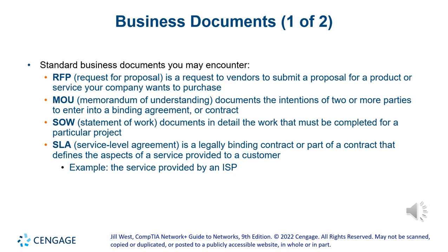Because, I don't know, a company might say on the RFP, I can provide you with the wireless, but I'm not a cable company. So you provide the cable. So you create a memorandum of understanding of what part I'm responsible for and what part you're responsible for. Then they can provide you with an SOW. Some people call it SO, I always call it SOW. It's a statement of work.